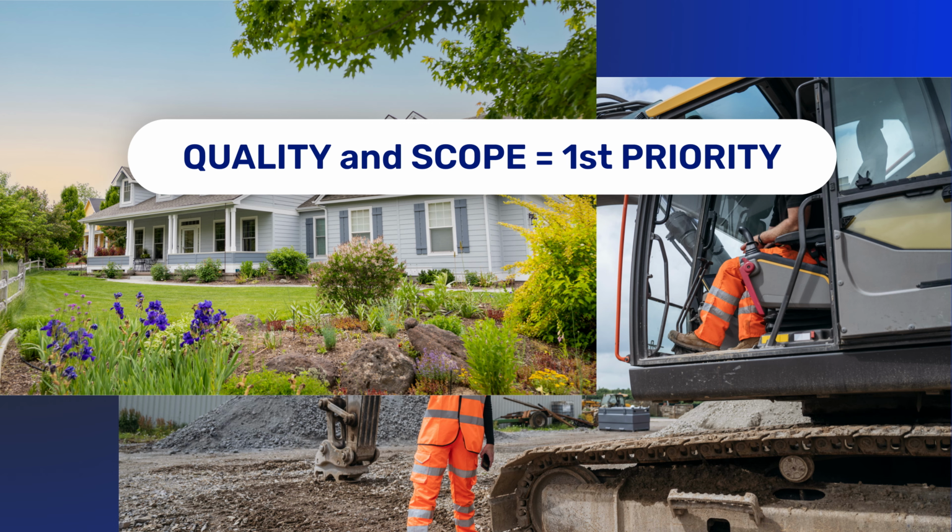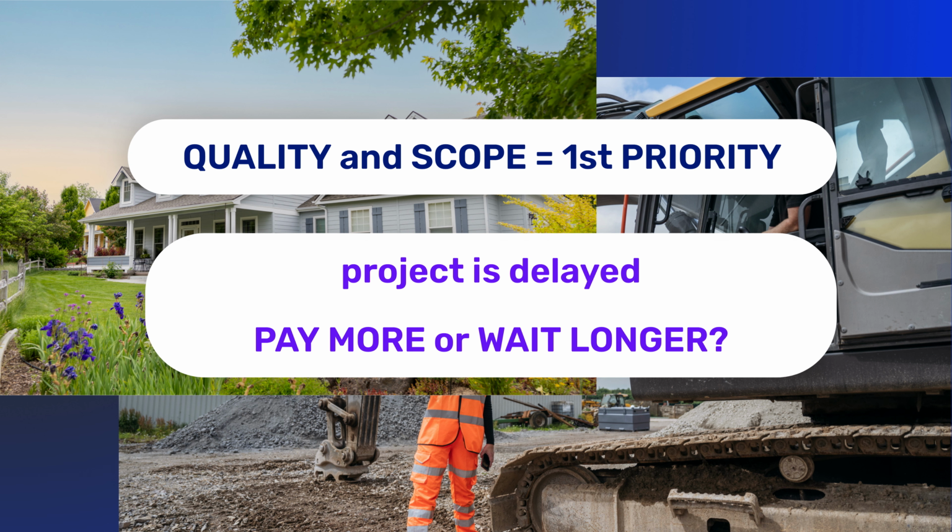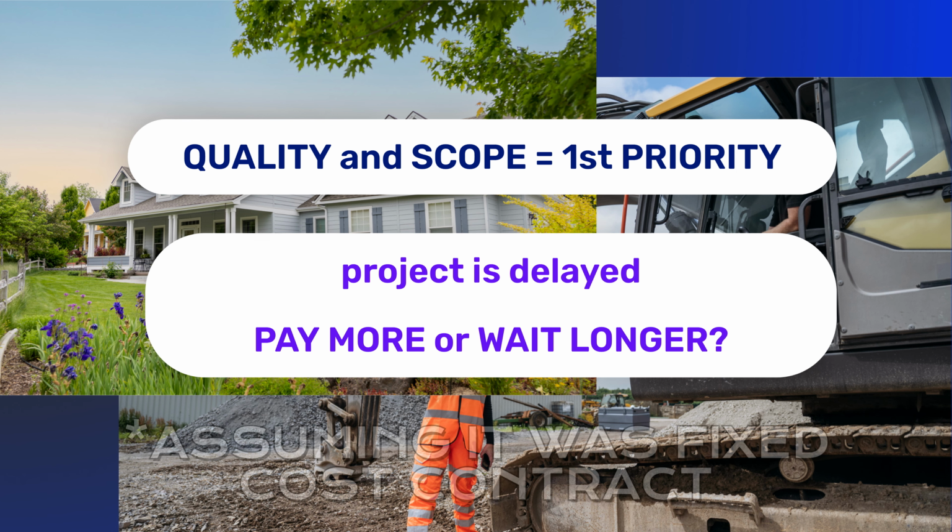And also in this example, you will have two options. You can pay more to this construction company so they can work longer hours and finish on time. Or if you prefer, they can work a few weeks longer, and then you have the option to stay within your original budget.